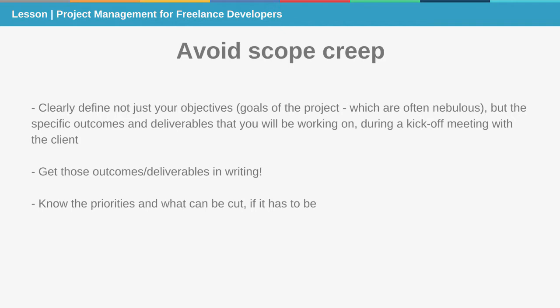So what you want to be getting out of this kickoff meeting is like, okay, I will deliver to you one wireframe, 3 mock-ups, 2 rounds of revisions, and the final product coded according to these specifications with 1 week of tech support follow-up. That's what you need to nail out at the very beginning of the project, because if you don't, it will come back and bite you later.